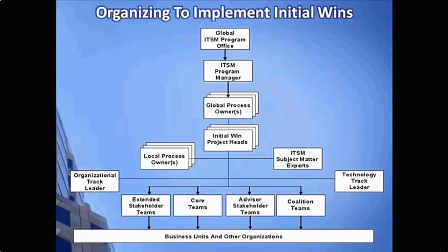Here's an example for how your IT service management program might be organized. Again, the example we used here was for a large global company. A small company, you may collapse a lot of these into one or two people to execute on. A large company, you may need a much more sophisticated project approach to do this. Since there are three major work stages occurring simultaneously, again, those work stages are your initial wins, looking at each thing by project, your IT service management design, doing the design efforts, your IT service management transition, doing the development and eventual rollout efforts.